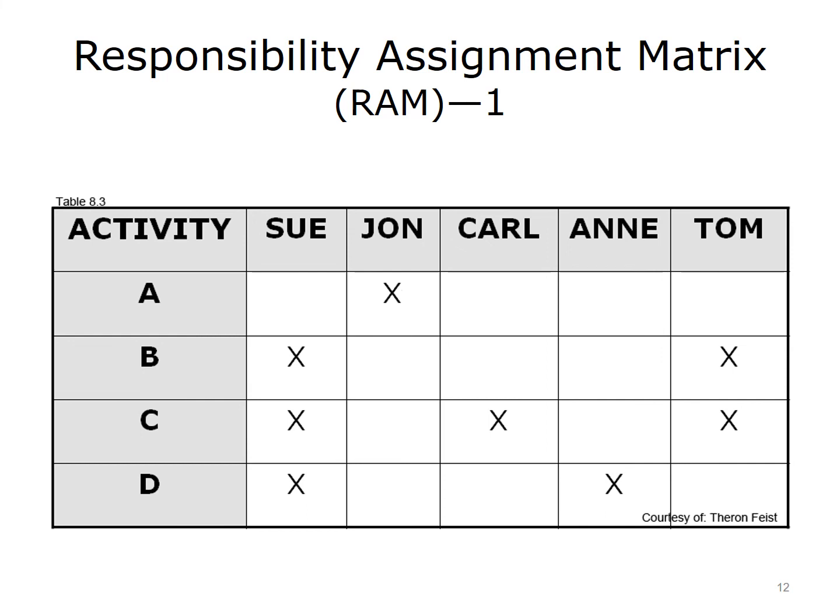A responsibility assignment matrix can depict when a staff member is overloaded. Example: if you know that you have a nurse for 3 hours a week, but your responsibility assignment matrix shows that that person is responsible for most of the activities, you may need to request additional resources.